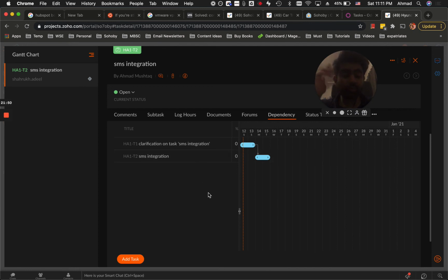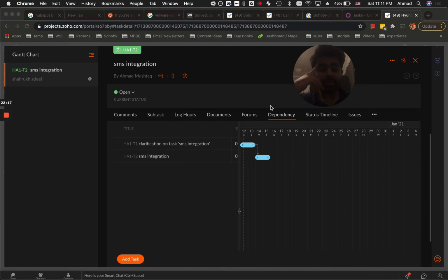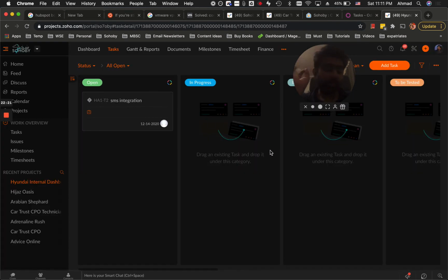And the truth be told, there will be a lot of tasks, and this feature will help you so much. We have so many projects, and in those projects we have so many tasks that are dependent on clients. And if something is dependent, the team can put their effort on something that is not dependent on the client. So this is your responsibility, to link tasks. And right now, I think this is more than enough for this video at least.